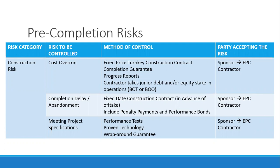There are three specific areas of construction risk. First is cost overrun — exceeding the budget. Second is completion delay or abandonment. Third is meeting project specifications — you might have a plant within budget and delivered on time, but it's not able to meet project specifications, meaning the water coming out is not clean.